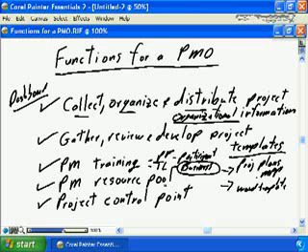There's a big difference between the resource pool, where the project managers are owned by the PMO, but then assigned to the business unit for project delivery responsibilities, and the actual project management control point, where the PMO retains responsibility for project delivery. Almost becomes on a contract basis, where the business unit contracts internally within their own company, but the business unit contracts to the PMO, and the PMO takes on the responsibility for delivering the project.